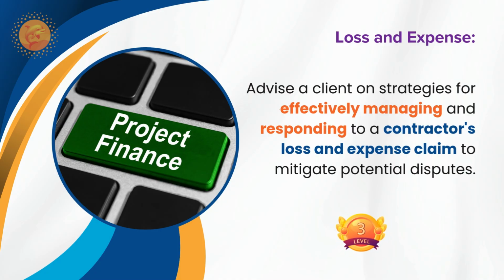In that kind of scenario, usually you will try to understand how the contractor is trying to claim his entitlement, substantiation, and particularly if you want to take any expert advice also, that is well and good. And furthermore, you will try to explore negotiation and early resolution while you are maintaining the detailed records of the assessments and communication. So that is very important when it comes to loss and expense claim.